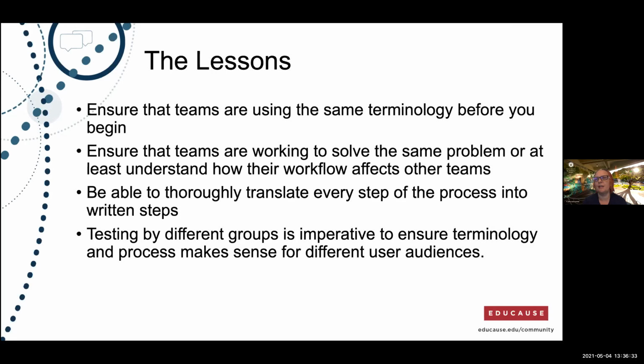One of the things was that department was used differently between the billing team and my team. The billing team uses it as the higher level department to take the money from. And for us, department could have been used for anything, the grant name, the project that it was under. Going into it, we found out that some of our terminology wasn't the same, and we had to adjust the process in order to make it work for every team that was involved.